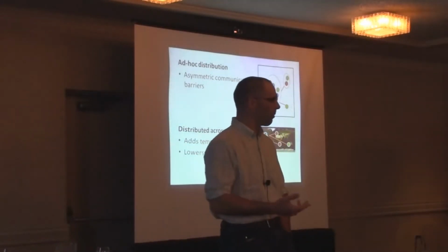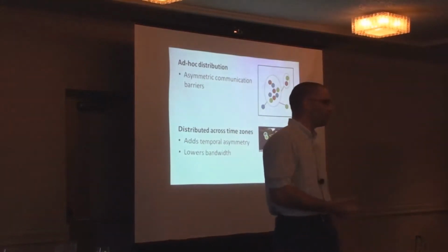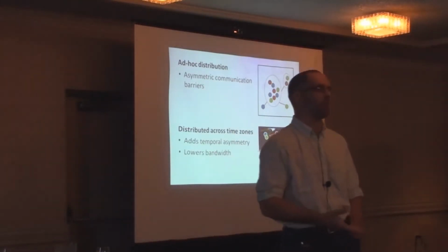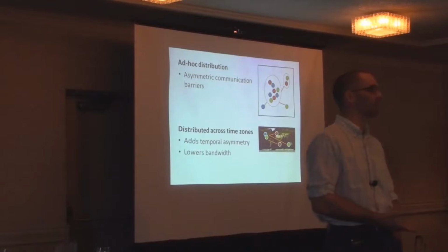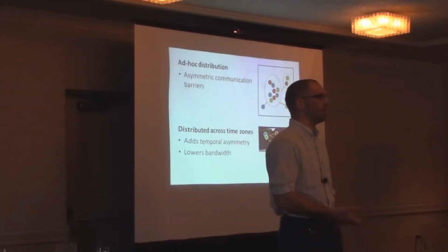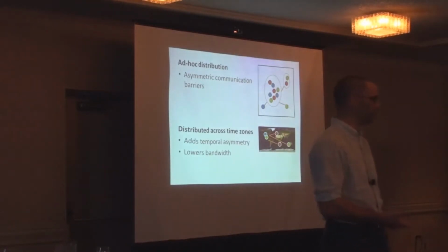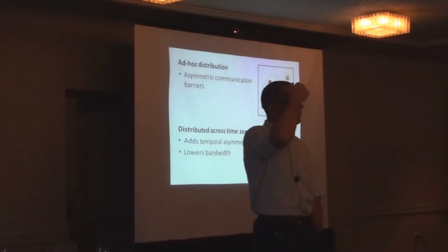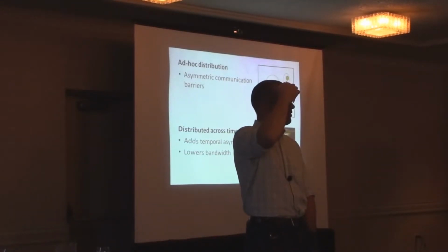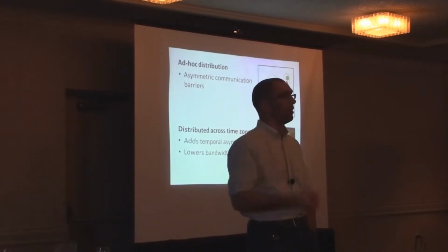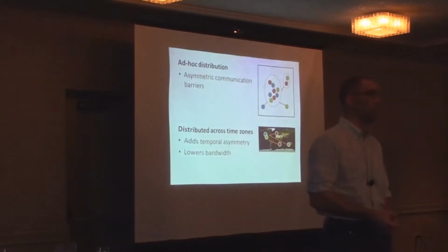Working with someone who's probably no further away in the UK is actually much, much harder because they're 8 or 9 hours different. So you really don't have any overlap there at all. And I'm pretty resistant to trying to work with split functional teams across those sorts of differences, simply because there's no good time of day to talk about stuff.